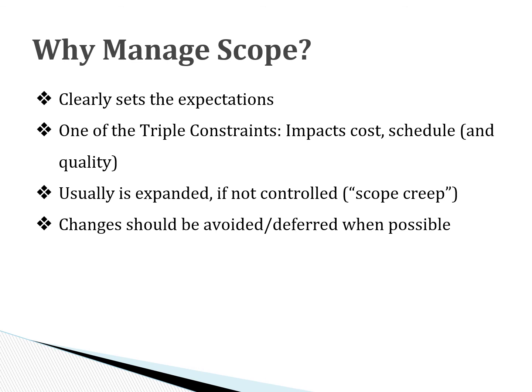That is what's called scope creep. Generally speaking, we need to avoid or defer changes to scope because it's proven that it is much more effective to finish a project and then add the changes later rather than try to make the changes along the way, unless those changes are critical for achieving the business objective of the project.